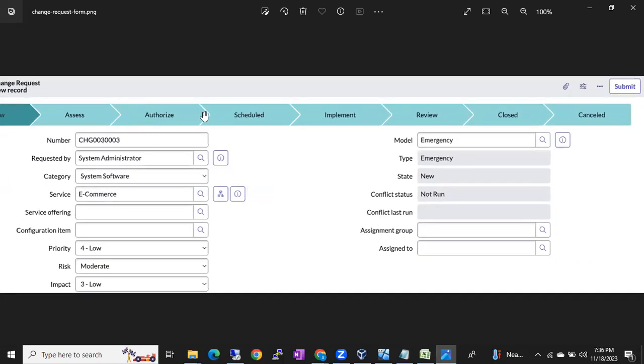Right. Fine. So imagine we don't have permissions to restart the Windows server before patching the SQL server. So we have to request Windows team to restart the server, right? So in such scenario, your Windows team also should be there in this change. So people from each team will authorize this change, and CAB people also will authorize this change. Once they authorize it, then only it will go to scheduled gate. Once all the teams that are participating in the change implementation authorize, including CAB people, then only the change will go to scheduled.